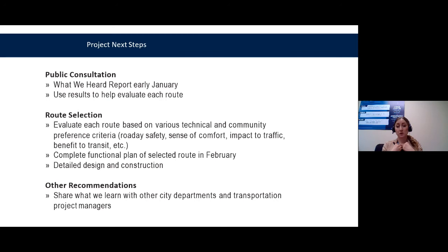Our job is to create this high level 30% design that we're recommending so that our engineers at HRM can build that preliminary and detailed design around what we're doing. So we're getting it to 30%. Garrett and the other engineers on our team will be putting that forward. So it's not down to the centimeter of what's happening on the street, but it's basically a proof of concept. It's showing feasibility and it's showing public support for how the route that we put forward is going to benefit folks who live in this community for accessing destinations and making it safer and more comfortable for walking and biking.